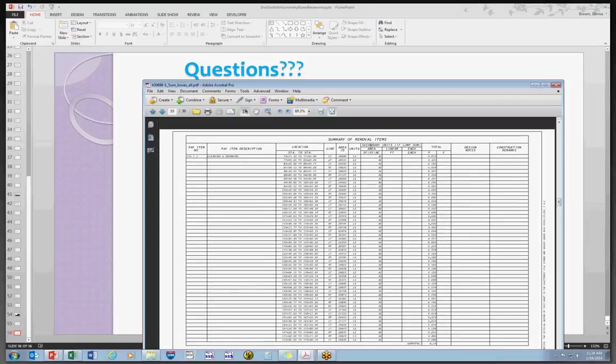Here's a good one, the removal items. The acres, this should have been the actual numbers. The numbers go over here. The top one should be a 1, and then the grand total of acres should be notated in the design notes.